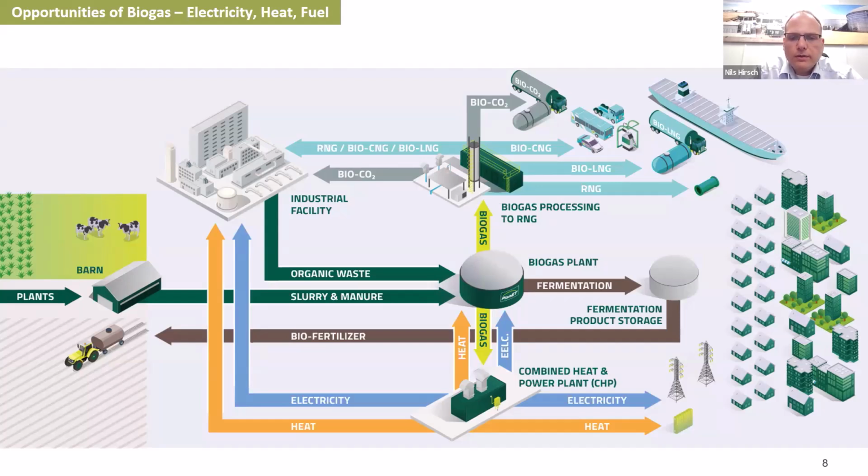And this is key now, and that's the theme for the next slides from Jelena as well. It's extremely important to develop the right concept in the early project phases. In those phases where you play with mass balances, where you do simulations, where you do testing, sampling, where you sit at whiteboards, where you conceptualize your plants. Those are the phases where you actually have the most flexibility to do modifications, to change, to adapt.